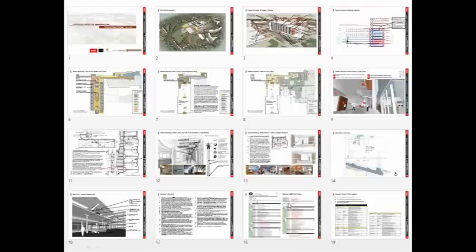You'll notice it's a LEED project, so we identified all the potential points, and then we also included complete interior finish schedules down to the base, every material we anticipated using at schematic design. And then we also listed what we call issues and assumptions, all the areas of uncertainty or potential risk for the owner and for the contractor that we were aware of. We advertised those to them so that, again, the budgets are reliable and good, and there's confidence in that as we go forward. It's worked very well.